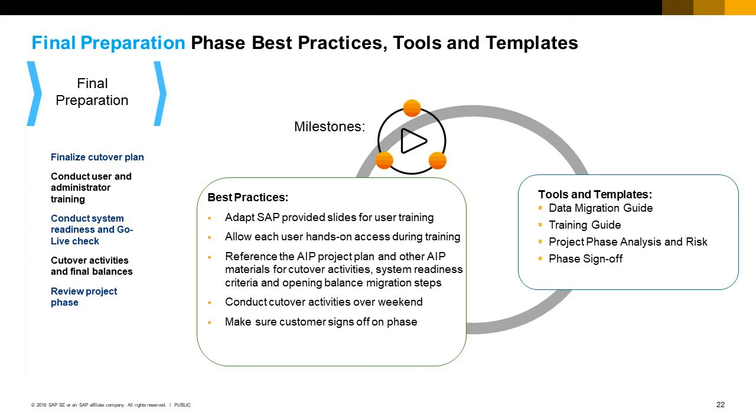Schedule cutover activities over a weekend or other quiet time. Make sure the customer signs off on this important phase. The sign-off commits the customer to the go-live date. Tools and templates you can leverage are: Data Migration Guide, Training Guide, Phase Sign-Off, Project Phase Analysis and Risk.